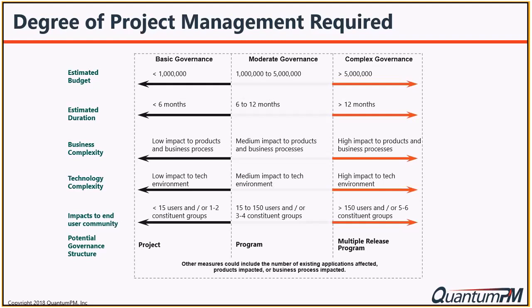This is another one in terms of when you're considering project management governance. Don't try to think you need the most rigid governance possible. One of the things I've found in doing this for a long time is that, depending upon the complexity of what you're trying to do, how risky the project is, whether it's something you've done many times, whether it's a high investment, the risk profile of a project can determine what governance should be put around a particular project as well. So it's really important when you're considering licenses that you also build the processes and structures and governance around it to drive the completion of the projects overall.